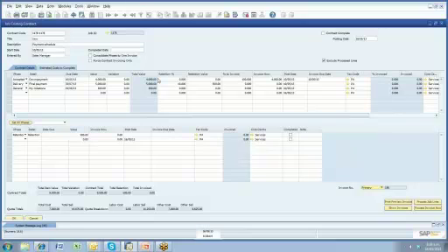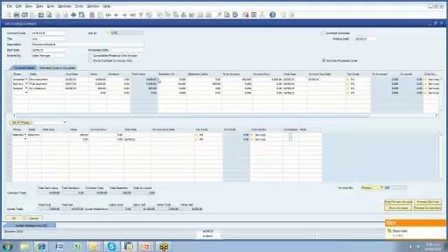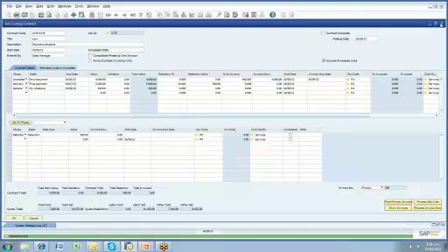So what's happening behind the scenes? Yes, an invoice is being generated, but instead of posting in the financial system to your revenue account, it's actually posting to a deferred revenue account. Then once you've done the work, there's another process to say, what does the button say? It's in here.